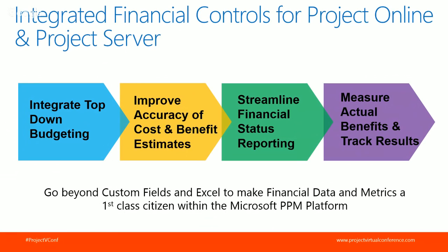It's also fair to say that financial information is going to be apparent in the project from cradle to grave. So whether it's the upfront budgeting, top down, bottom up, or whether it actually goes beyond the life of the traditional project into establishing frameworks to track results. I think it's fair to say that many organizations still aspire to have a benefits realization framework, but we need to go beyond just using a project's business case to get a project funded and actually start to use that as an artifact to start to track benefits and actually see how good we are at benefit estimating and our ability to realize those resulting benefits.